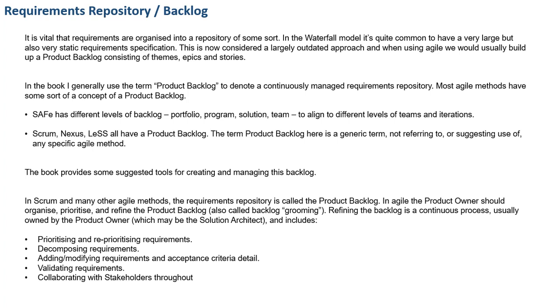So a much more flexible approach is you have your backlog, which consists of a number of different levels of requirements. So the broad theme, the epics, kind of grouping of stories, and then the stories themselves. Stories are kind of, this is what I want to achieve, this is the feature I want, or you can have non-functional stories as well, and then the stories in turn get broken down into tasks to implement those stories. So it's kind of hierarchical, but very flexible. So you can move stories within sprints. So you'd allocate stories to sprints, and within that sprint, you could do your solution architecture and development and implementation to implement that story. And I've covered sprint-based architecture in, I think it was, the second video.